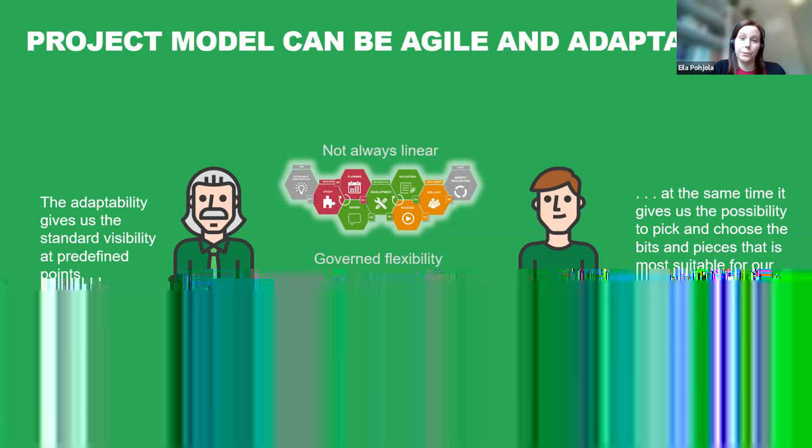Good. And so in the next slide, I will show you how our current portfolio model, or our current project model, is a gate-based model. It's in the top of this slide. And typically our projects take a very, very long time. They take months or even years. And that's why here in the bottom of this slide, we started to add some agile elements into our project world, so that in each of these phases, pre-study, plan, implement, or rollout, there can be agile elements, and still we can have these gate decisions at the same time.